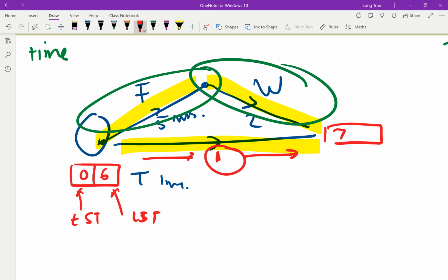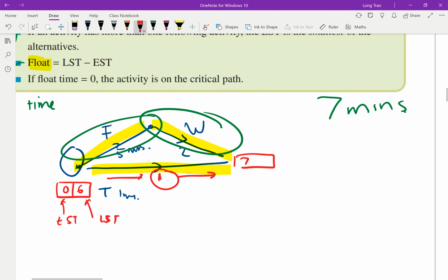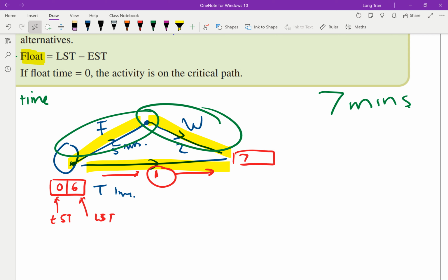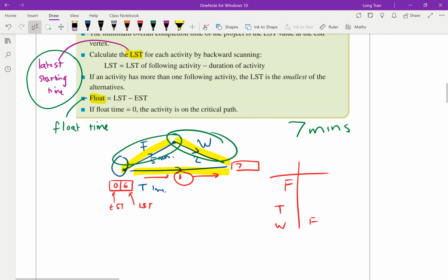So you can take this scheduling, and now you can change that into a precedence table with what's linking to what. In this case, F starts by itself, and T starts by itself. T doesn't require anything, but we know that W requires that F needs to finish. Hey, that looks like FTW, for the win. But anyway, that's an example of a precedence table. What we're missing here is the weights.